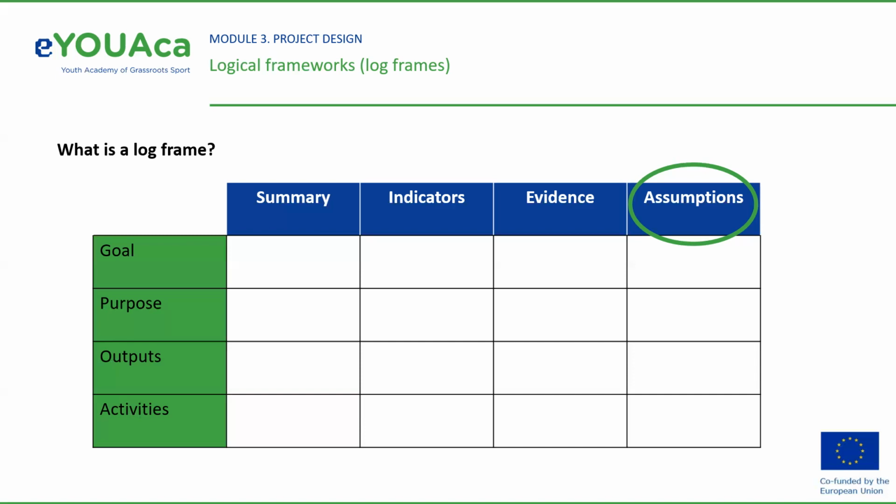It will have become apparent during the analysis phase that the project alone cannot achieve all objectives identified in the objective tree. Once a strategy has been selected, objectives not included in the intervention logic and other external factors remain. This will affect the project's implementation and long-term sustainability, but lie outside its control. These conditions must be met if the project is to succeed and are included as assumptions in the fourth column of the log frame.